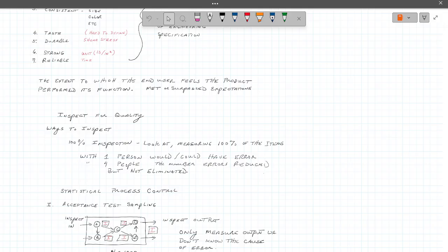How many of those samples do I actually have to pull to verify the concrete's right? So I'm going to mix, not the slump test so much, I'm going to go mix cylinders off the back of that truck. And how many of those do I need to do if, let's say, we got 16 or 20 trucks coming in that day. That's what you're going to do statistical sampling of, so I don't have to measure every concrete cylinder. Okay. Could you? Sure. But you really don't know, and is it really worth your time and money?